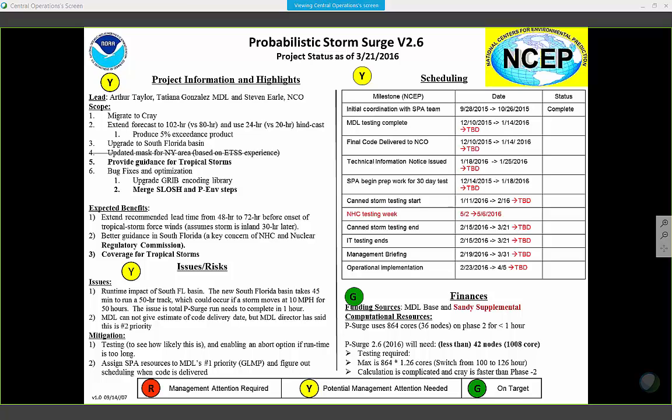Appreciate that, David. The other issue here is when I asked MDL for implementation priorities, this is not their number one. Gridded LAMP is. So if I only have one spot of work in MDL implementation, I have to give them Gridded LAMP based on the director's priorities. I don't think Gridded LAMP is a NOAA milestone. It's actually an AOP milestone. Mm-hmm. When Mike Farrar gave me the prioritization, he put Gridded LAMP and said this is our AOP milestone.